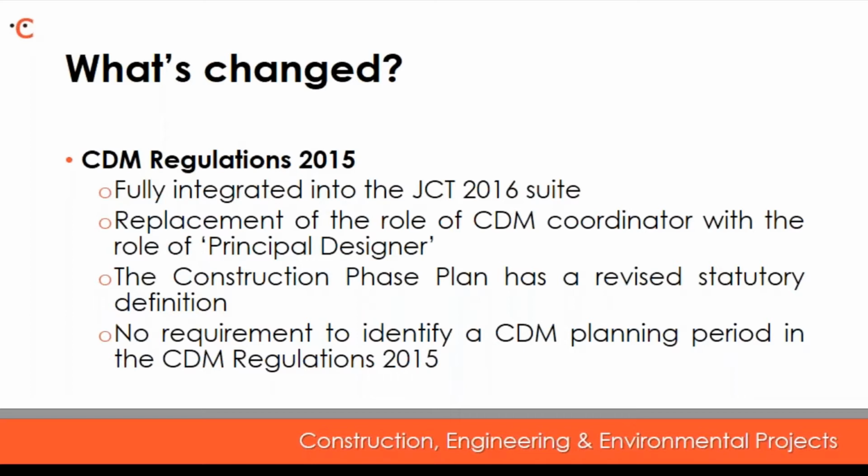Although the new CDM regulations take quite a different approach, the 2016 edition amendments are relatively minor. The most significant of the changes is the replacement of the role of the CDM coordinator with the role of the principal designer. You should all be familiar with this change, but as a quick reminder, principal designers are required to be a designer with control over the pre-construction phase of the project.